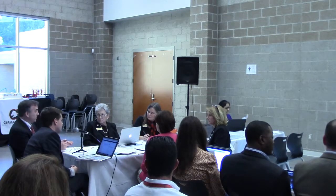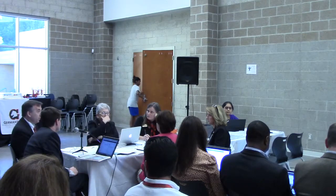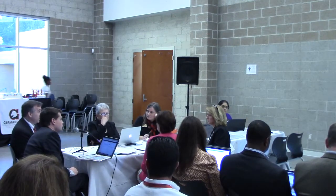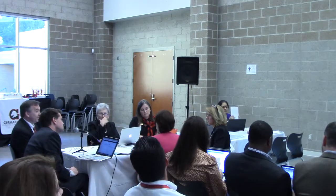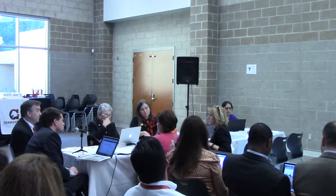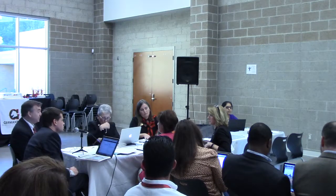But what they want for this is to use the foundation as the funding body, the 501c3 that accepts the donations, and then that foundation would give us the money. So know that anytime you have a building or a facility on your property, we would be liable for what's not paid for on that building. So what we're looking at here is unless it's structured with the lender. Yes, but it's unlikely. It's all about how the contract is written, and whether the lender can look to any collateral versus just the written agreement from the pledge.